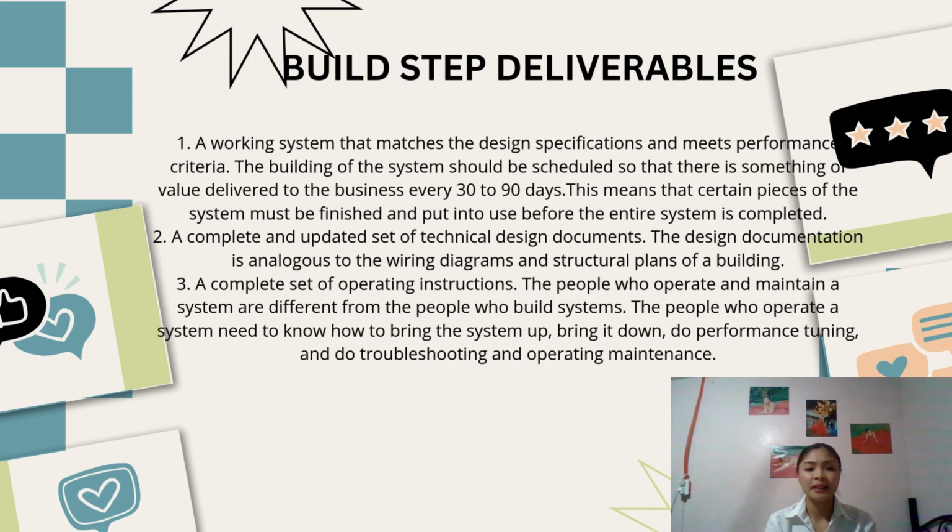Build step deliverables. Number 1. A working system that matches the design specification and meets performance criteria. The building of the system should be scheduled so that there is something of value delivered to the business every 30 to 90 days. This means that certain pieces of the system must be finished and put into use before the entire system is completed.